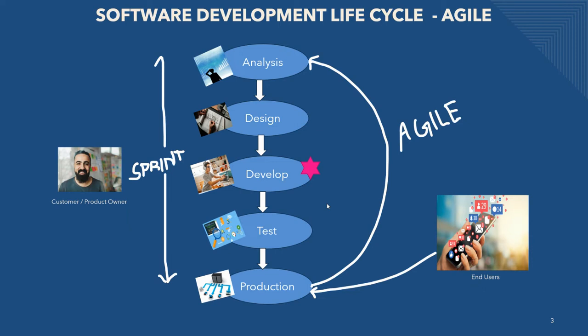In an agile delivery model, a development lifecycle model, the customer or the product owner sets up the priority of 2 to 4 weeks of requirements, which is set up as a sprint. Everyone in the project team works to deliver this specified 2 to 4 weeks of requirements set up in the sprint, and delivers the product, which would be an improved version of the previous product in production, so end users will have access to improved product features.